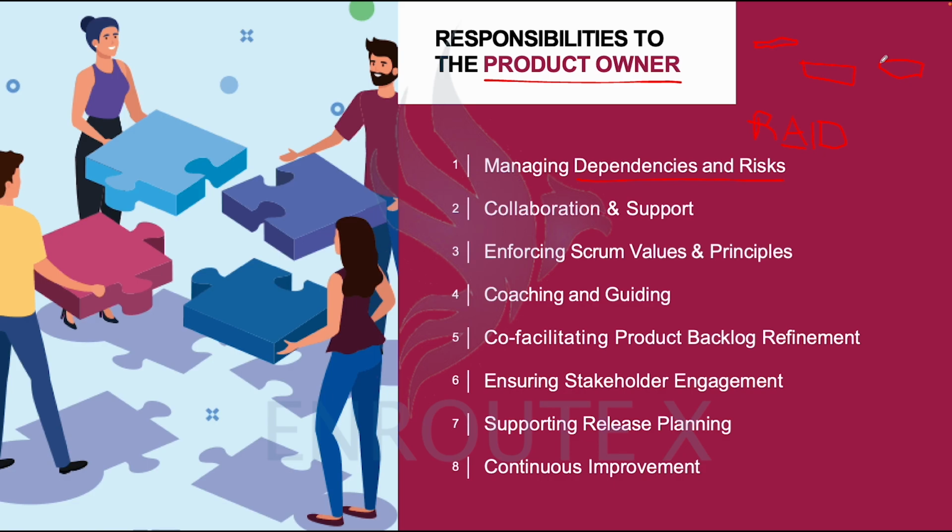So in that sense, when you have dependencies come to play, when you begin to have multiple teams working together on the same product or on the same project, the way to plan for it is the work that needs to be completed first needs to come to early sprints. The work that needs to be completed next would then need to go to latter sprints.